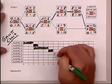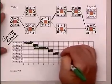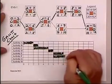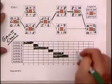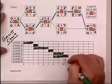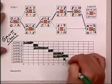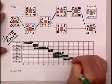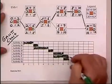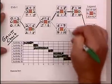E takes two days, F takes three days, and then as soon as E is done, G can start, which is the eighth period. That takes two days, and then finally H can start when both G and F are completed.